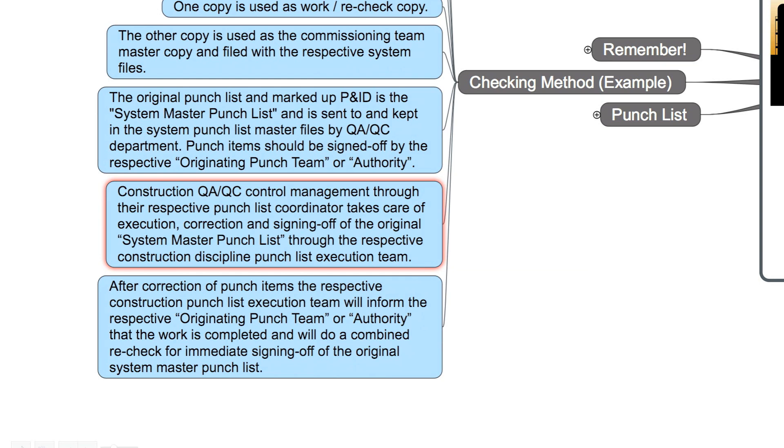Construction QA/QC control management through their respective punch list coordinator takes care of execution, correction, and signing off of the original system master punch list through the respective construction discipline punch list execution team. After correction of punch items, the respective construction punch list execution team will inform the respective originating punch team or authority that the work is completed and will do a combined recheck for immediate signing off of the original system punch list.